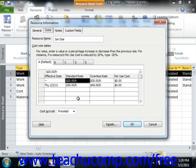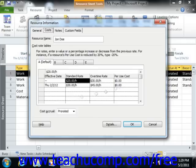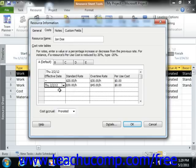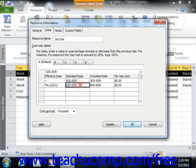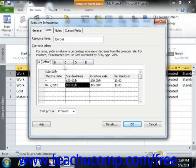Note that on the Costs tab, you can enter the same rate information that you have available in the resource sheet view. However, you can also specify different rates based on different dates by entering the date that the new rates are to take effect into the Effective Date column and then entering the new rates as of that date. Also note that you are entering this information into Tab A within the Costs tab. You should note that there are also four other tabs that you can use in order to enter different pay rate tables.